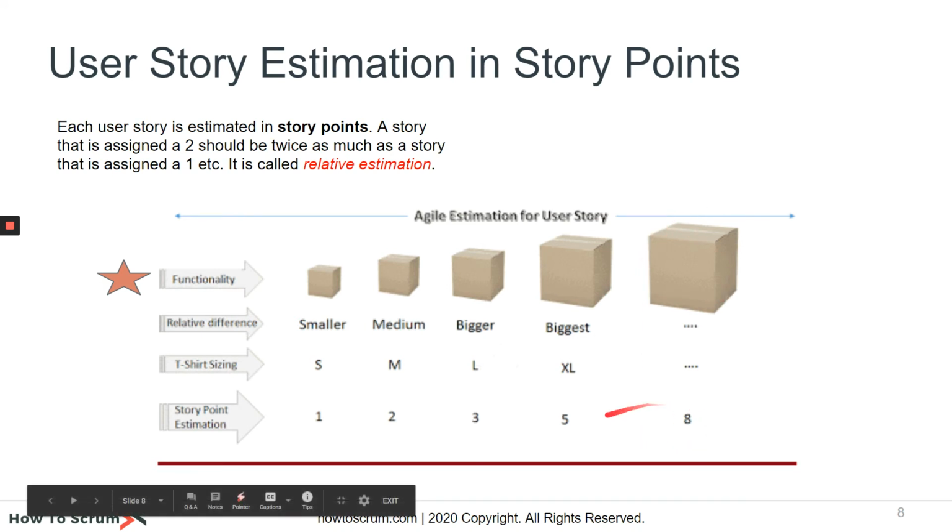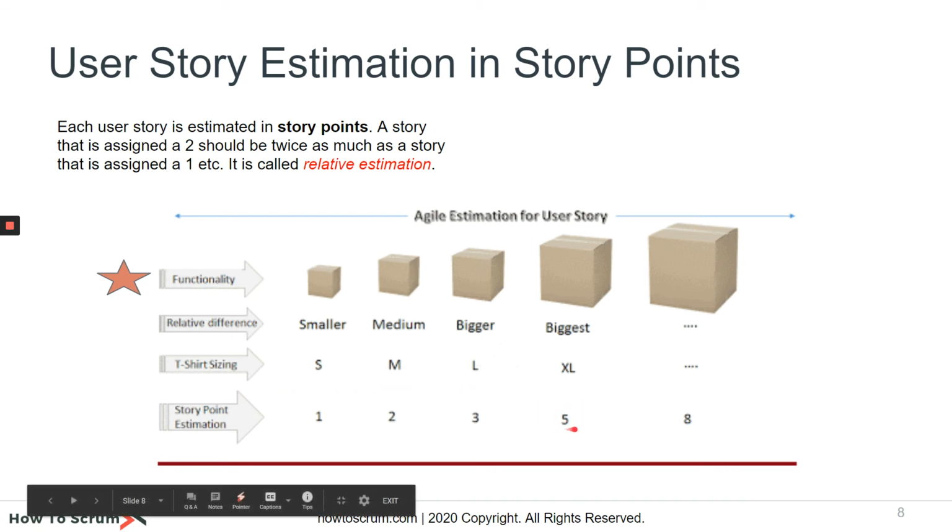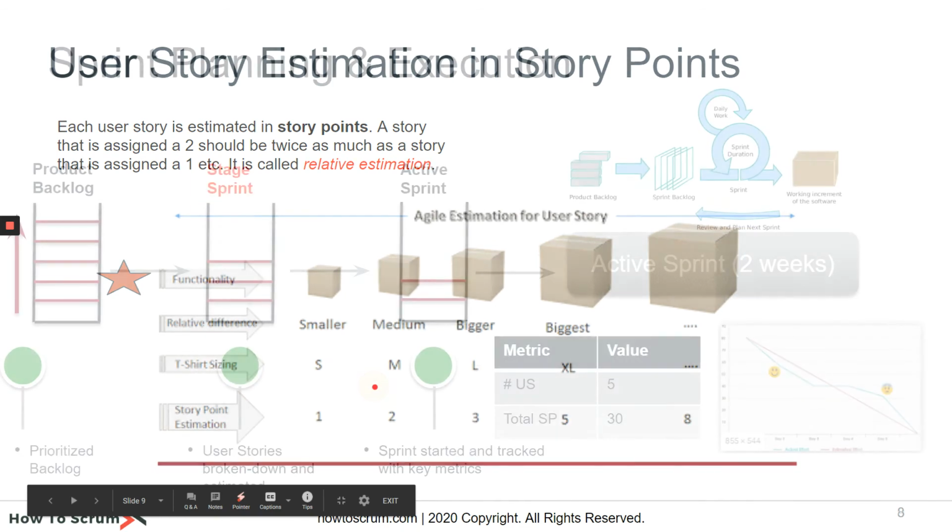So normally I will cap the estimate to be no more than 5 story points, because that should be enough for a team to work on within a sprint that is, like I said, 8 days. If it's a 10-day, 100% commitment, you want to give that 80% capacity. So you would normally have people just estimating every ticket, which is 5. If it needs to go more, you should split that story into smaller ones, 2, 3, or 2, 2, 1, for example.